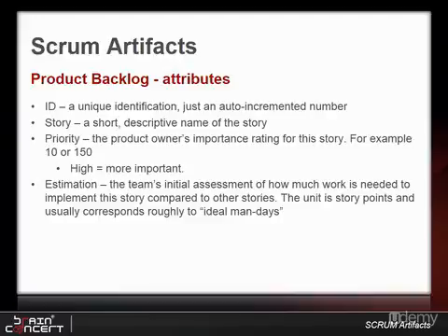The important thing is not to get the absolute estimates correct. A 2-point story should take 2 days. But the relative estimate is correct. A 2-point story should require about half as much work as a 4-point story.